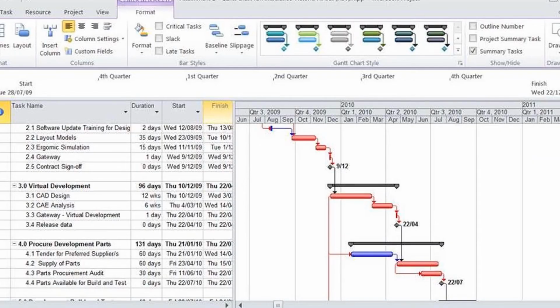We can make Gantt charts more complex, and when you use Microsoft Project or any of the other project management software that is available, you'll see that Gantt charts can also display the relationships between activities using arrows, and the relationships between activities on the critical path, which in this case are red. You'll be able to see that some activities are grouped into phases, and also we can have a more complicated version of the timescale across the top. This Gantt chart shows months, quarters and years, but in Microsoft Project and other software you can change that timescale to suit your project.